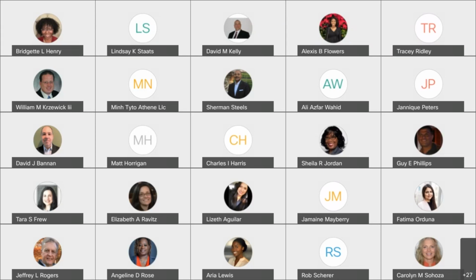When should the transfer of knowledge take place? Should it take place at the end of the project, at the end of each phase of the project, when the lessons learned register is archived, or throughout the project? Who wants to be my hero this time? Throughout the project. Thank you. I always love having a new hero. Thank you.